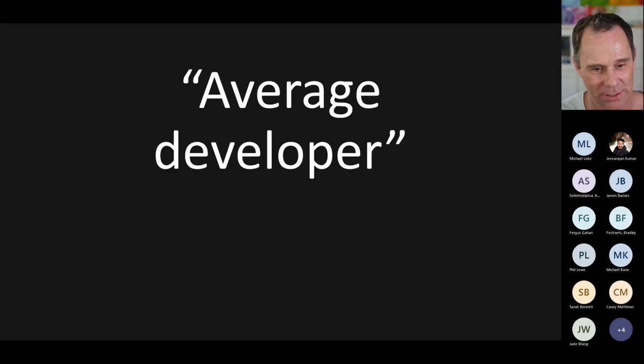What some teams do is come up with this idea of an average developer, which I think just takes a bad guess and makes it worse, because now I go, well, I'm worse than average. So I will imagine that I could get it done in 2 days, but an average developer could do it in 1 day. Jiva's thinking I could get it done in half a day, but I'll reduce my estimate to 1 day to counteract this average developer idea. And we've just got all this fudge factor in the middle. Don't do that either. It doesn't work.